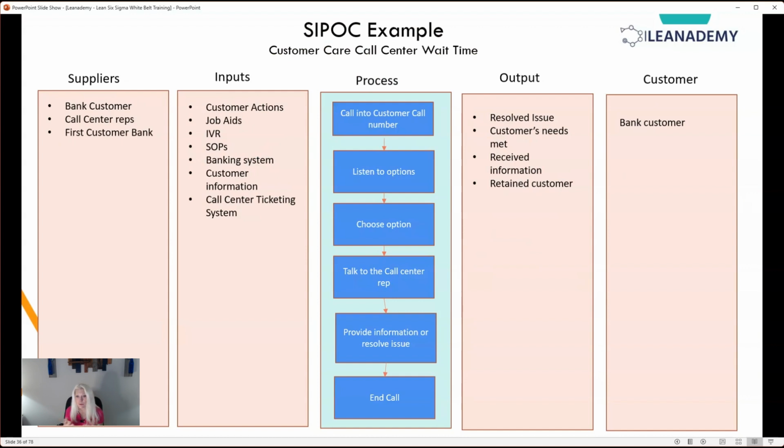So that's basically what a SIPOC looks like. The process part of it is hard to do, but it's very valuable. It gets people thinking about what process you're going to work on, what the starting and ending points are, and it gives you an idea at a high level of where we're going to concentrate on your project.